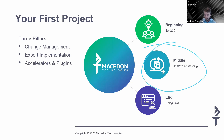So systematize looking from the outside in at those key success indicators or potential risk factors, and then incorporate that in. Then finally, you're executing the same way according to the same methods and procedures every single sprint, you're looking at the project from the outside in, and now communicate that to every party involved the same way at the same time on whatever your reporting period is. We like to do weekly risk and escalation executive status meetings — just bring the project sponsorship in. It can be 15 minutes if nothing's going wrong. We have the forum to make it longer if something is. We make sure everyone's on the same page at the same time so that there are no surprises.